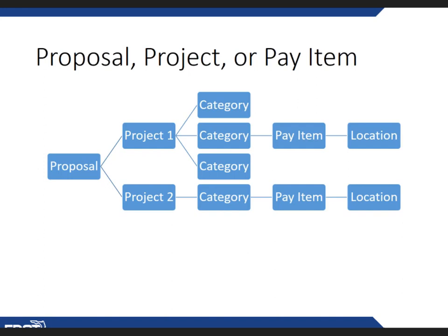And the reason is, when we come to account for the legislature, every now and then, especially in those tight budget years, we get a question: how much money have you spent on lighting, and how much money have you spent on signalization, and similar type questions? If items aren't loaded in the proper category, we can't generate the appropriate reports. So yes, we're being picky on some of that, but it's a matter of being consistent and being able to account for things.